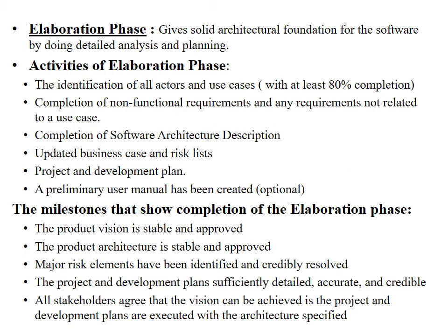In the elaboration phase, the project team is expected to capture a majority of system requirements, to perform identified risk analysis and make a plan of risk management to reduce or eliminate their impact on final schedule and product, to establish design and architecture, and to create a plan which includes schedule, cost estimates and achievable milestones for the next phase.